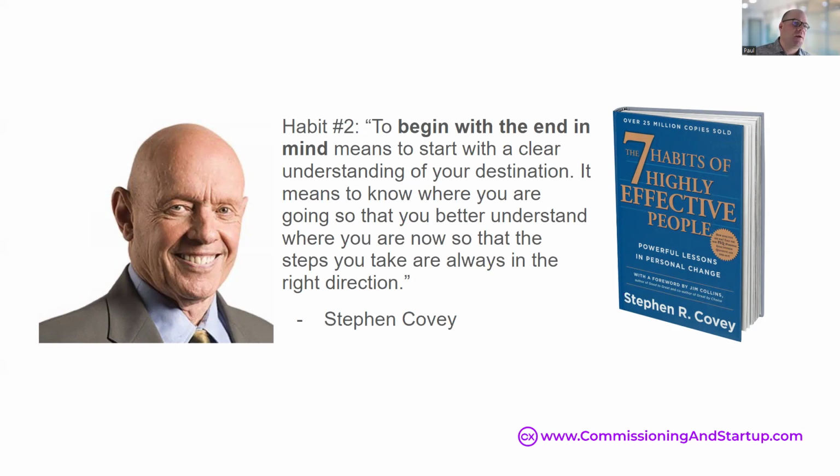You can think about it this way. You want your projects to be successfully completed, so you need to define what that success looks like during commissioning right at the beginning of your project. The only way to do this is by planning projects from right to left instead of from left to right, like most projects do, which means you need systems and processes for commissioning early in your projects so that everyone on your project can focus on what success looks like during commissioning. There's just no way to successfully complete projects unless you start with the end in mind.